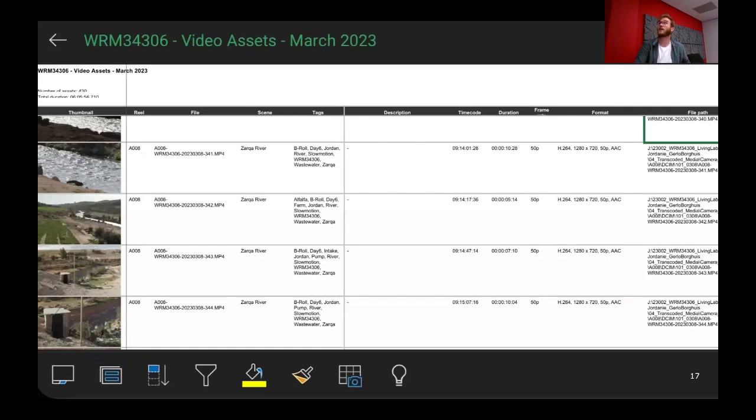In my next slide, I'm going a bit back and forth now. So this is a list of all the materials that we shot. Remco was by himself when he went on location, and he realized we're not following one way to go from north to south, which was the initial idea, that we would go interview different people. When you go on location, plans change. So he quickly realized I need to attach locations, GPS data, and as soon as I get home, I need to make sure that I add metadata to all my materials. He knew he could only go there once, so he shot a lot of extra material.